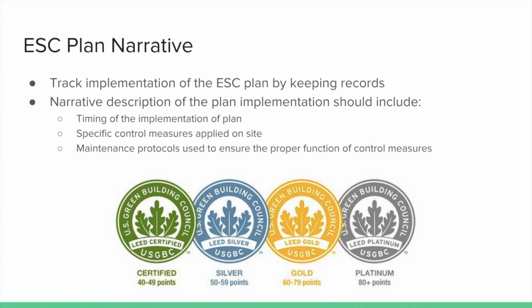With the ESC, tracking is implemented by a plan narrative, and this just means you're keeping records of everything that happens throughout the construction. It's a narrative description of the plan. Implementation should include the timing of it, specific control measures that were applied on site, and maintenance protocols used to ensure the proper function of control measures. And then at the bottom of the screen, that's just the regular points for the LEED system.